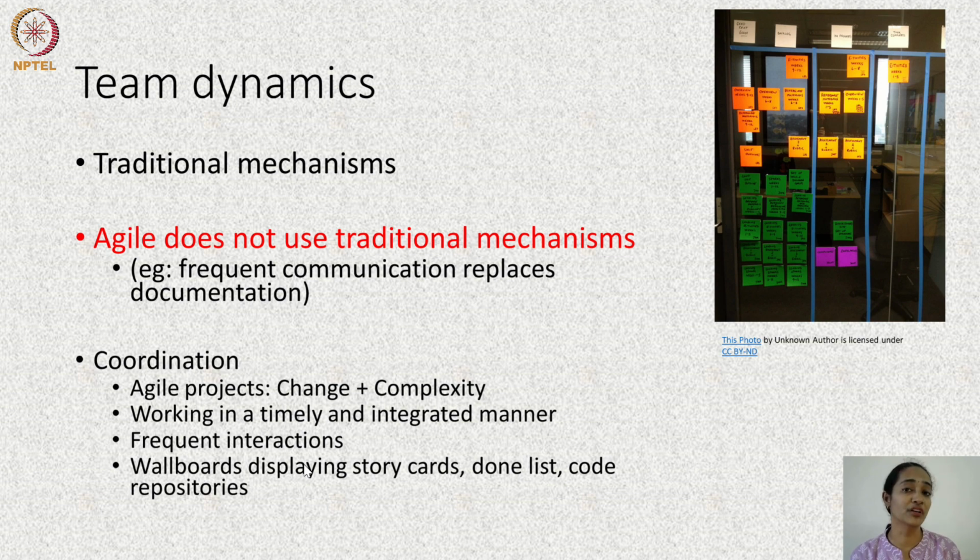Another important difference between Agile teams and traditional teams is that it is not the team leader or the team manager who identifies the tasks and assigns them to a team member. The assignment of tasks among team members, and how and when it should be done, is something which the team members decide along with the product owner and the Agile coach.